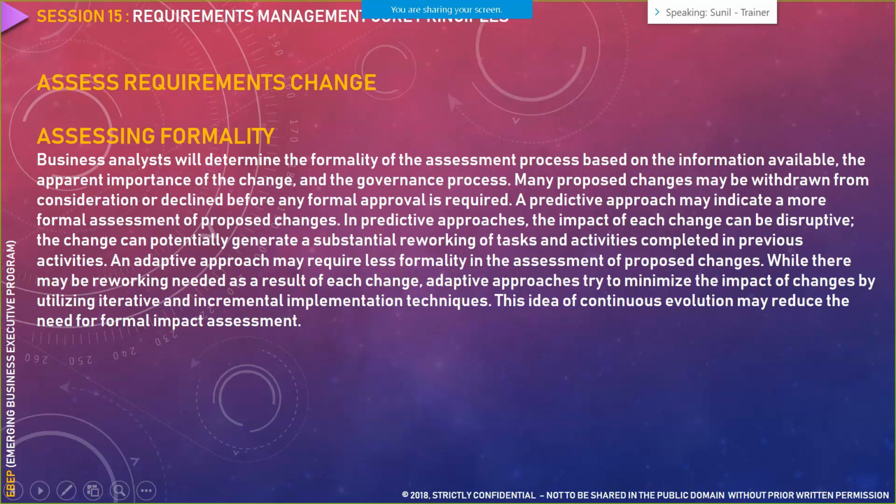Now, how do you justify it? You have to justify it formally. Probably you would write a small business case giving your justification why you would need extra resources to complete this particular piece of requirement. If there is a timing associated with it, for example, instead of the customer quoted 1 month of time, you feel that the requirement would take 3 months of time, because customer would always quote less time, you have to give them a justification around why it would take 3 months of time. So those justifications have to be assessed and given formally.